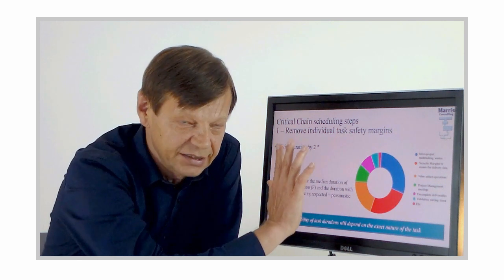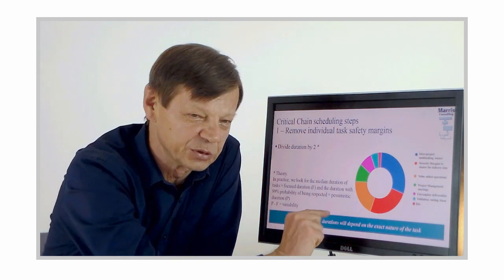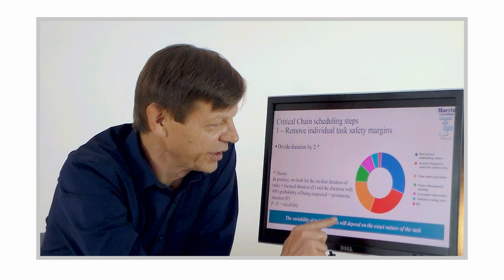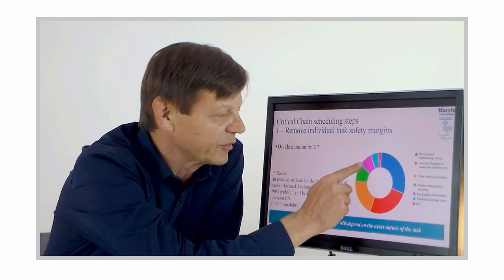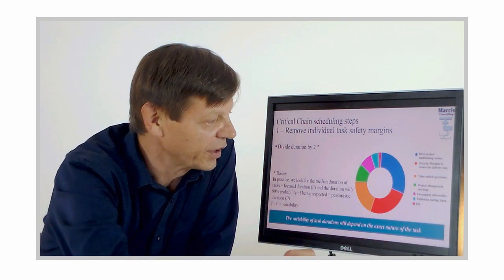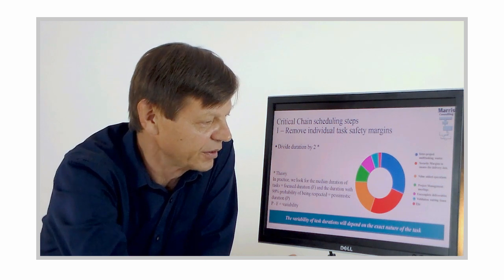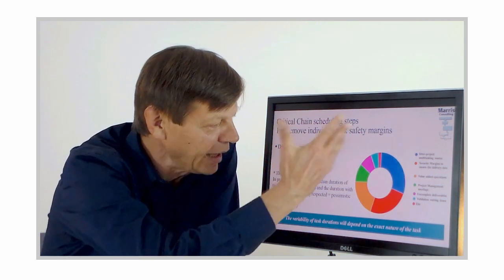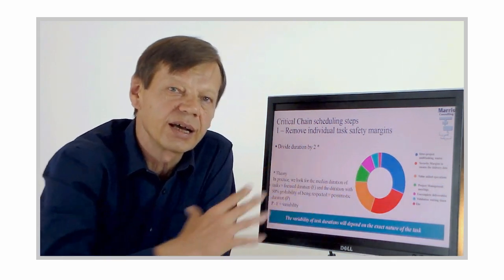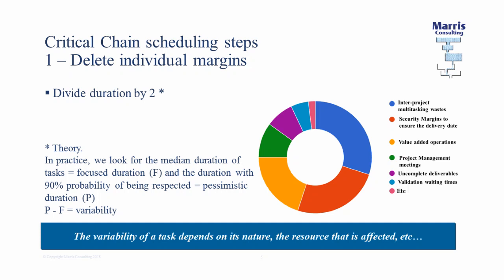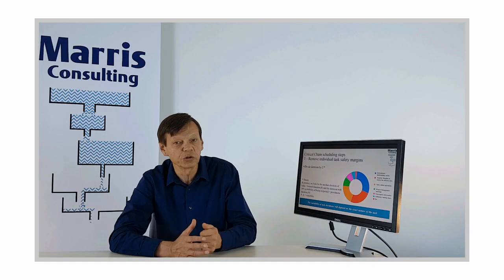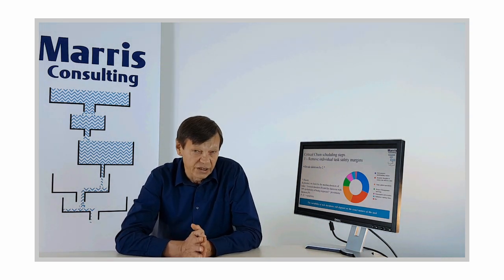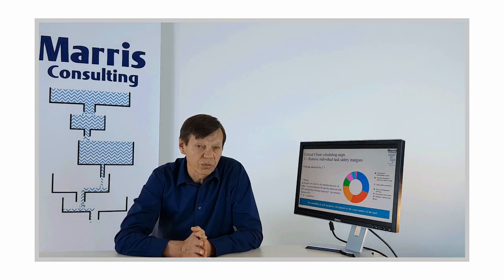They're going to have meetings, as you know, to explain why they're late and where they are and where they're going. And they're going to have to waste time going to find deliverables that are incomplete, and lots of other stuff. Anyway, as I say, if you explain to everybody that it's not any kind of individual fault, but a collective situation that has led to local securities, you can get individual task safeties eliminated from the schedule.